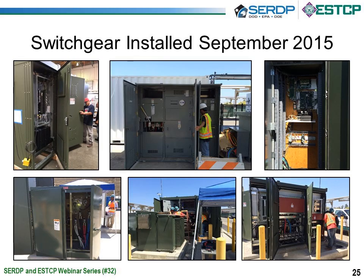To be honest, the switchgear was actually one of the difficult things to get designed, get on order, and actually get delivered. Apparently, a lot of the switchgear manufacturers are on back order. These things are not necessarily easy to put together overnight. It takes time. There's a lot of checkouts that need to occur. So the switchgear you can see in this particular photo is it being assembled at the manufacturing facility. This is it installed at Miramar.